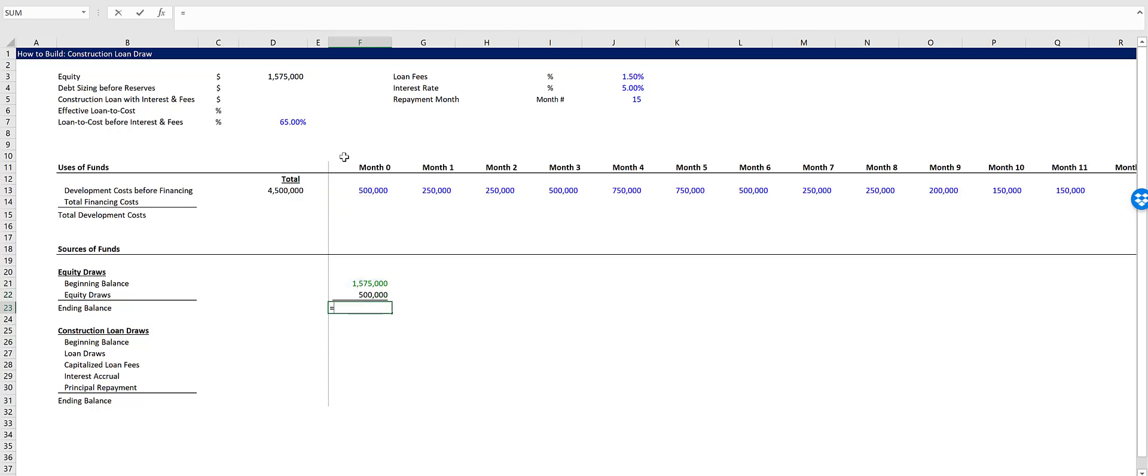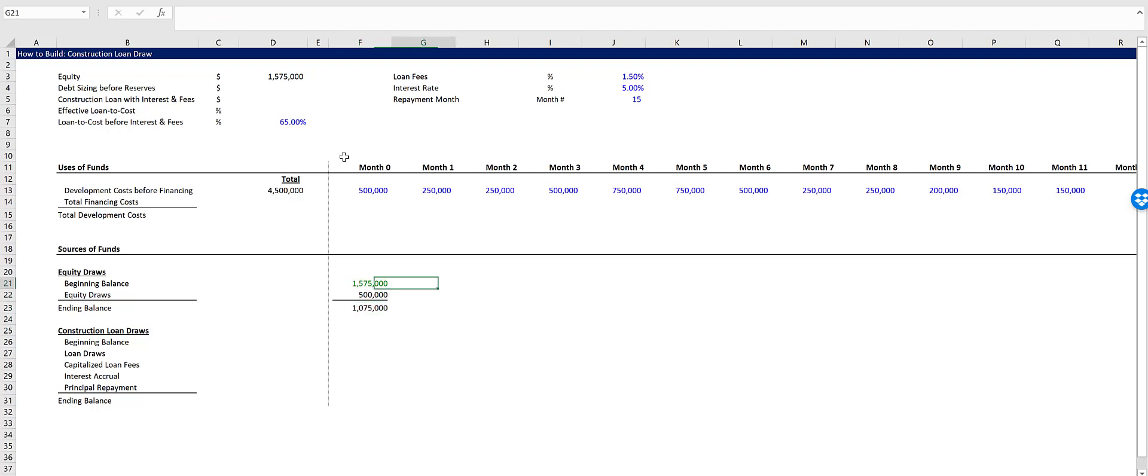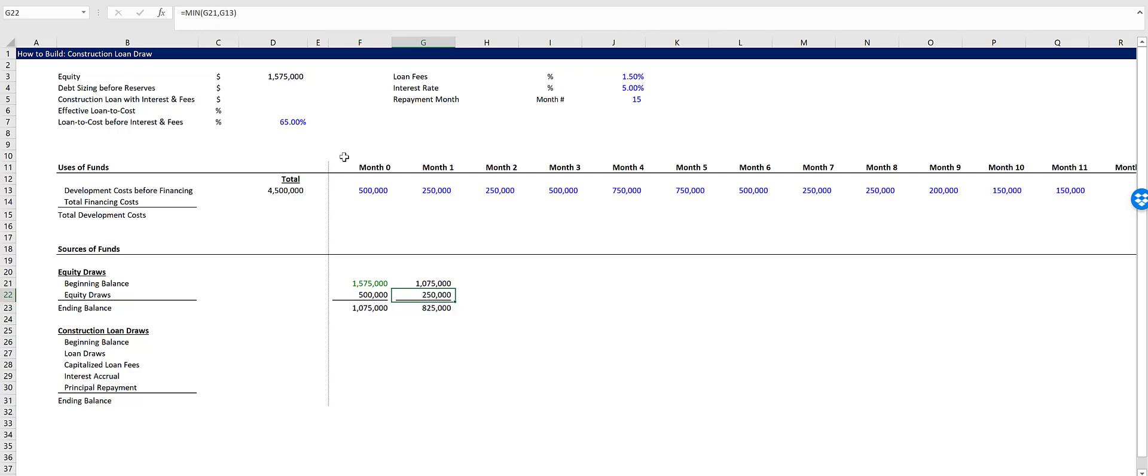And then our ending balance will simply be the beginning balance minus the equity draws. And then for month one, which is the next month, we will take the previous month's ending balance. And then we can copy this across and you'll see how it starts to draw down.